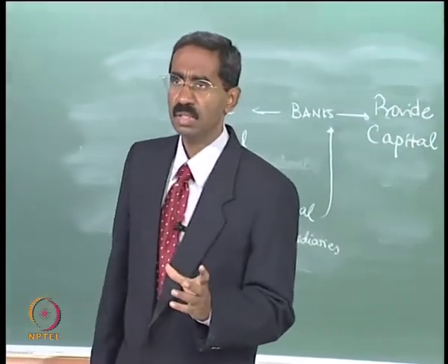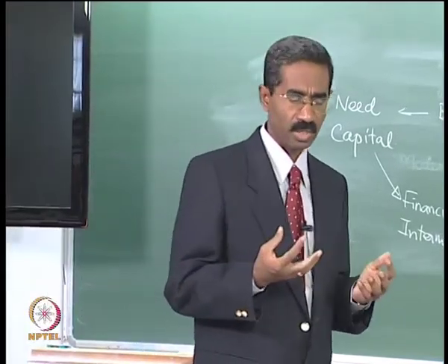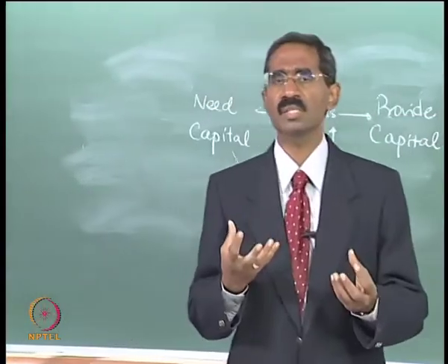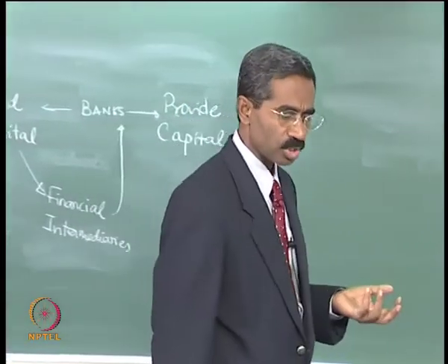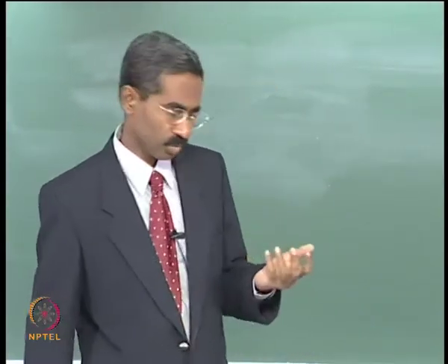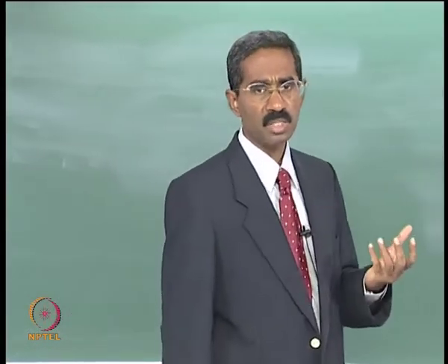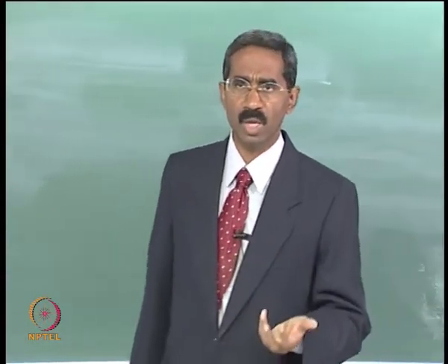The second is the legal. What are the clearances that are needed for the project, right? And who are the agencies that are responsible for getting the clearances? Who should be approached for getting the legal clearance, for getting the environmental clearance, who should be approached for getting clearances related to other approvals like right of way and so on.